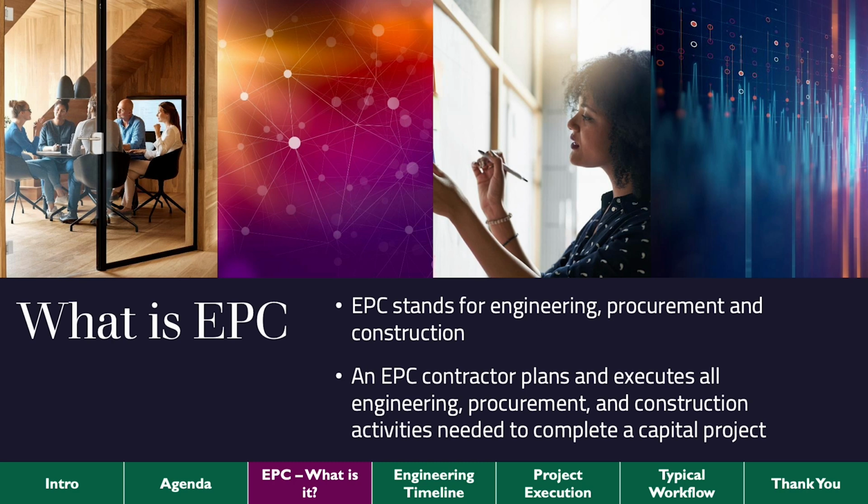So what is that contract for? Why do I need that contract in the first place? Under an EPC contract, a contractor must deliver a complete facility to a customer or developer who needs only a turnkey to start operating the facility. Hence, EPC contracts are sometimes called turnkey construction contracts.